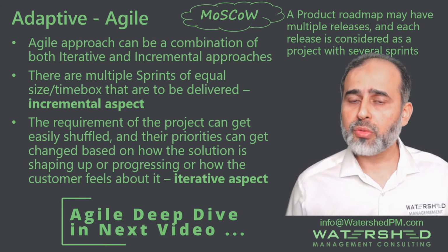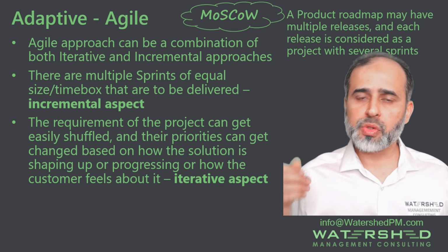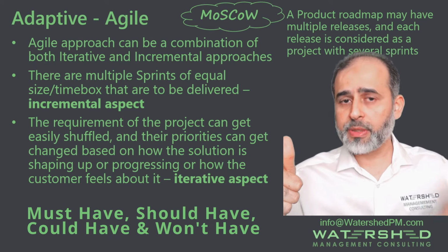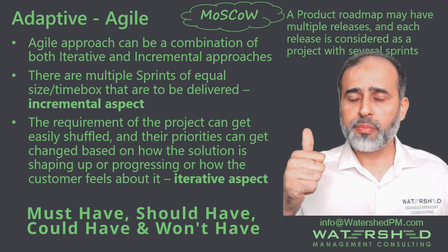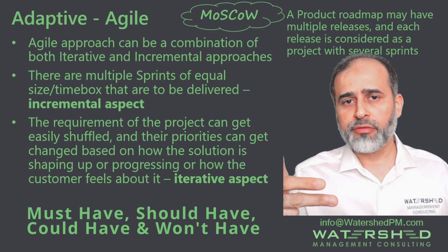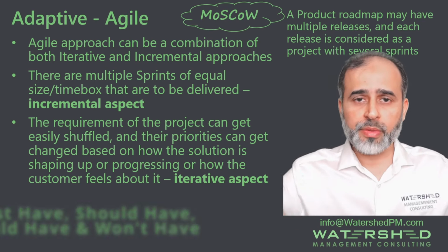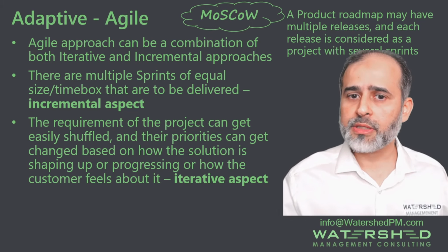One of the common tools that gets used for prioritization is referred to as MoSCoW. MoSCoW is must-have features expected in this sprint, priority 1. The second level of priority is should-have features, and then could-have, and finally features which won't be done, won't-have. So that is your acronym MoSCoW, used for prioritizing features.